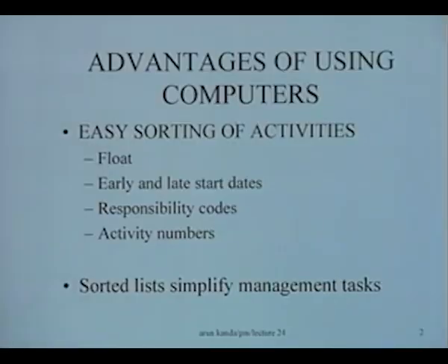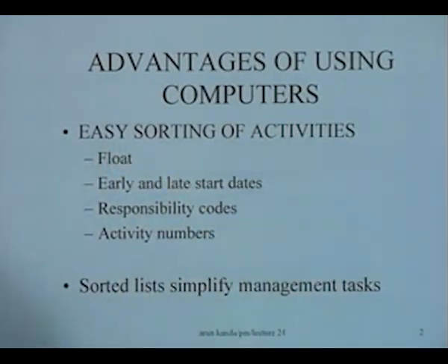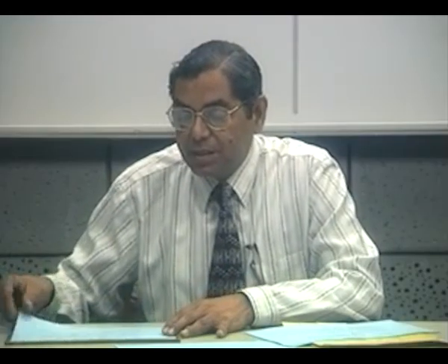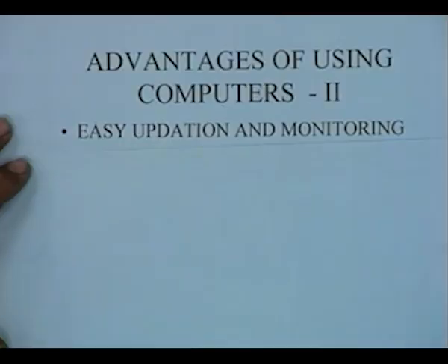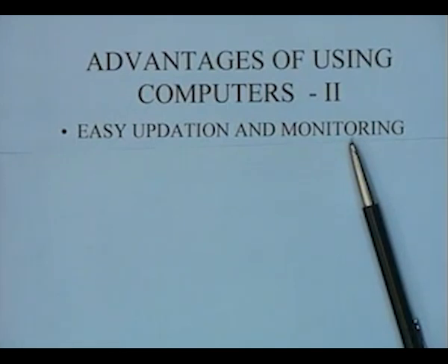So sorting of activities by float or early and late starts or responsibility codes or the activity numbers could be very useful to management. Apart from this, another very important use of computers is that they permit easy updation and monitoring, and I think this is perhaps the greatest use of the computer in practical project management.